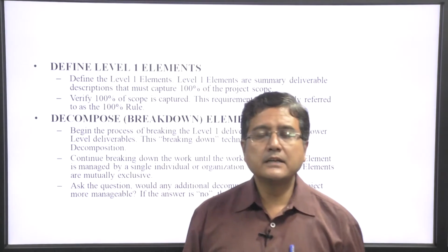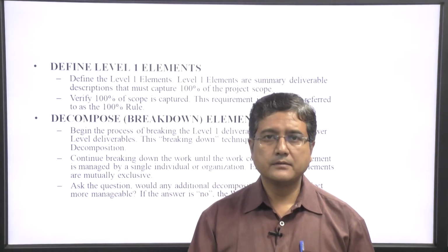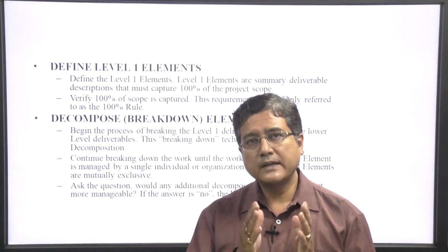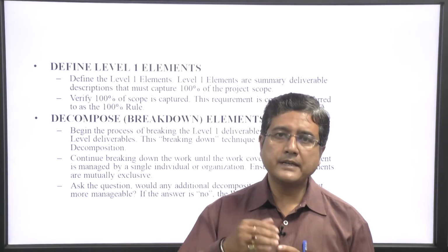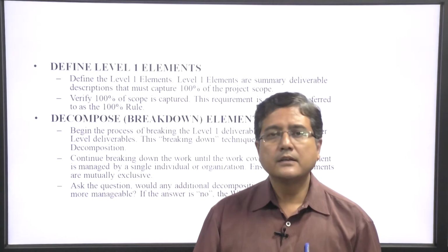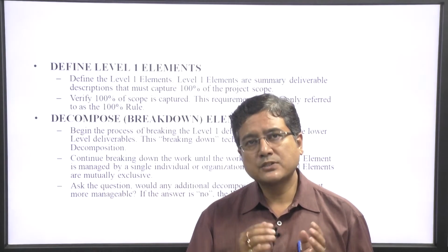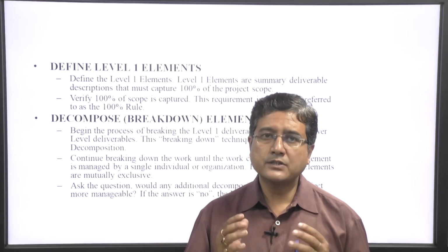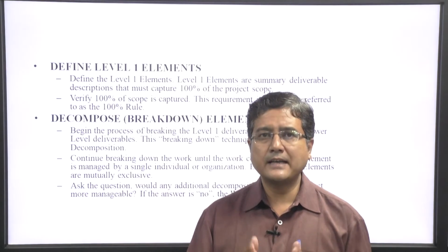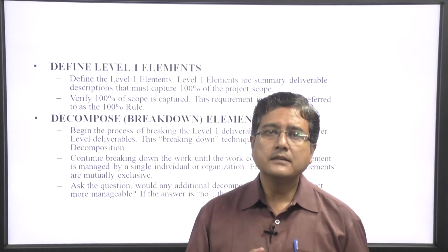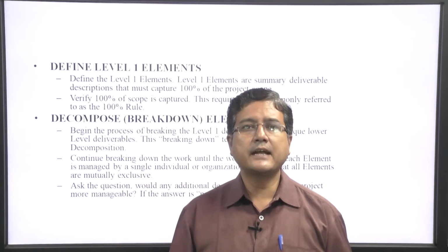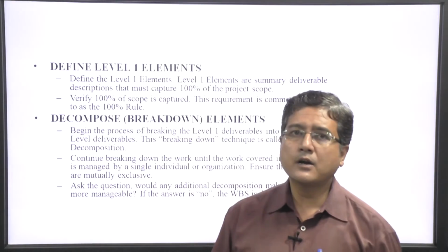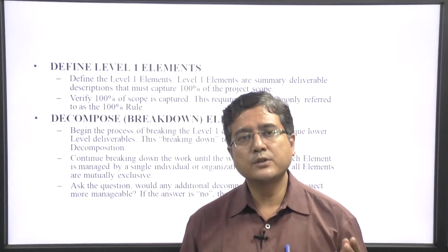We break down the activity in such a way that it organizes the things, they are related to each other, they have a starting point, they have a finishing point, and they have relationships like FS, SF, FF, SS. So, there are different relationships with the different activities, and we break down the various activities accordingly, according to the time framework.